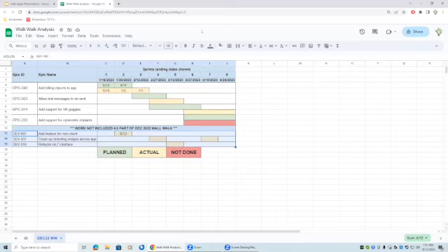But what this gives you is the information and the power. This tool that you've created, I was trying to invent this myself when I was a Scrum Master, and it's super powerful and super useful when you're able to calculate the capacity of your teams. When they ask you to do something new, what I would recommend is say, give us a moment to size it or put an estimate on it, and then show them with the work that's already in flight how big that work is, what it's going to push out with this tool. And then they're like, oh, maybe I don't want that thing, right?